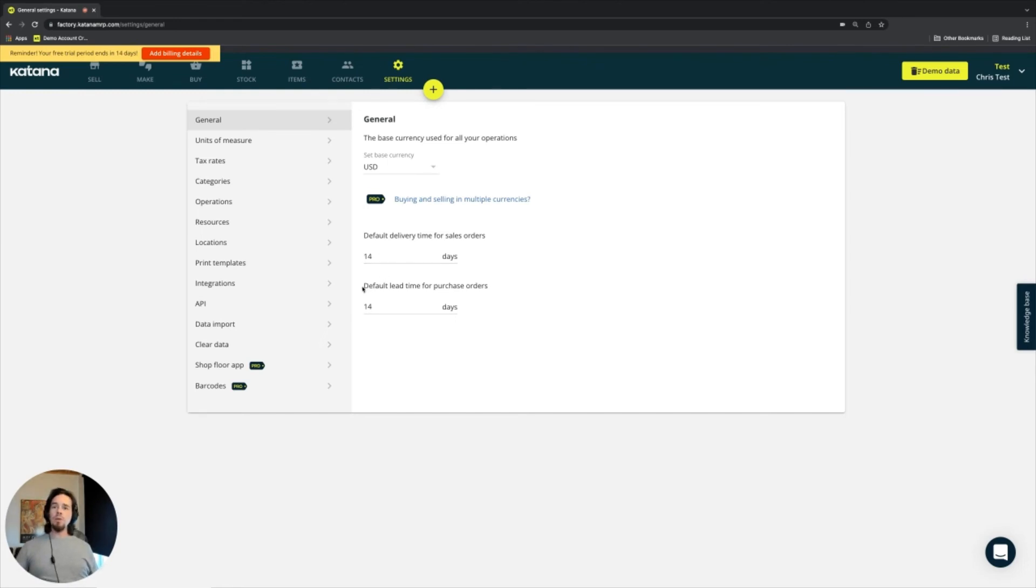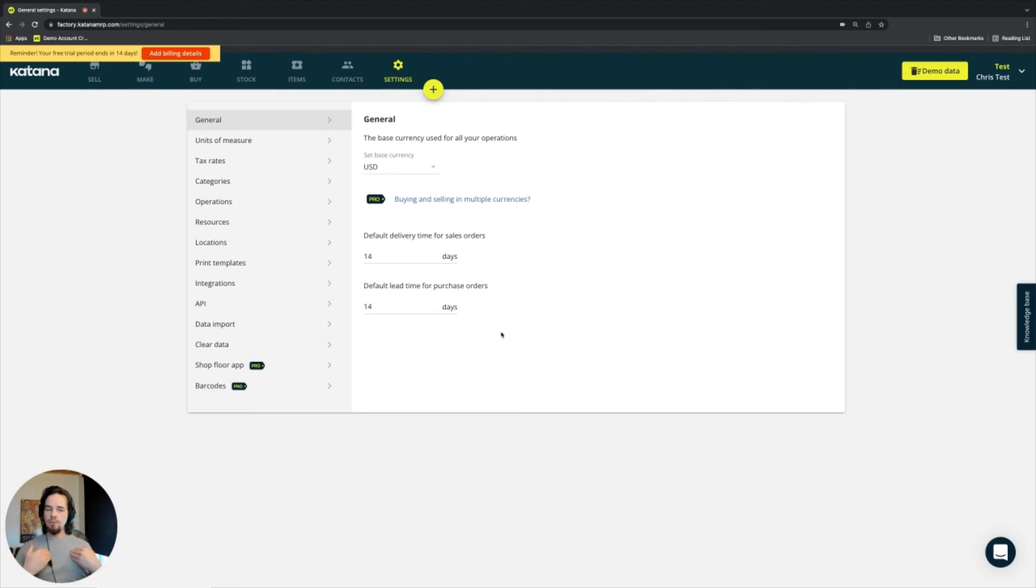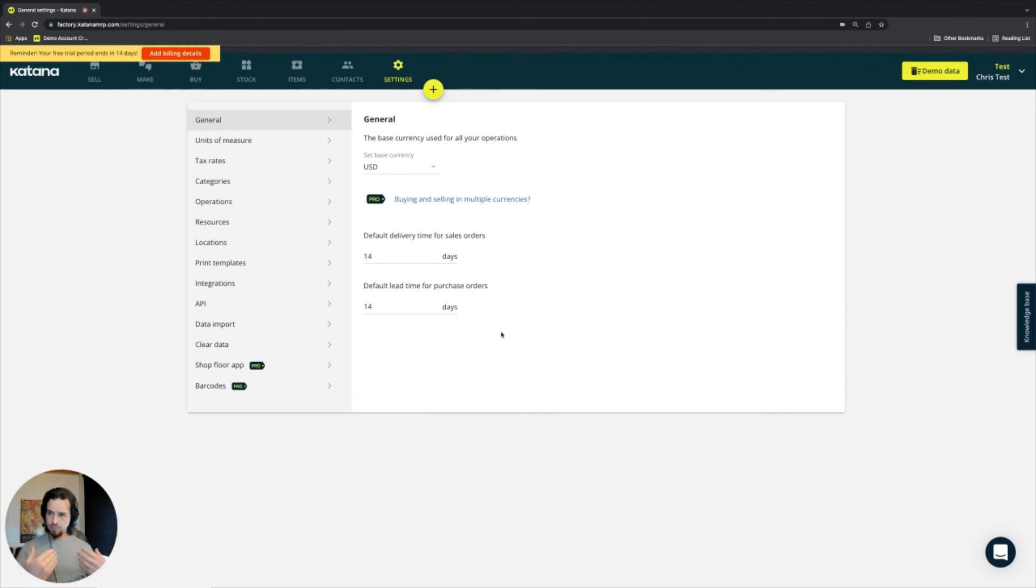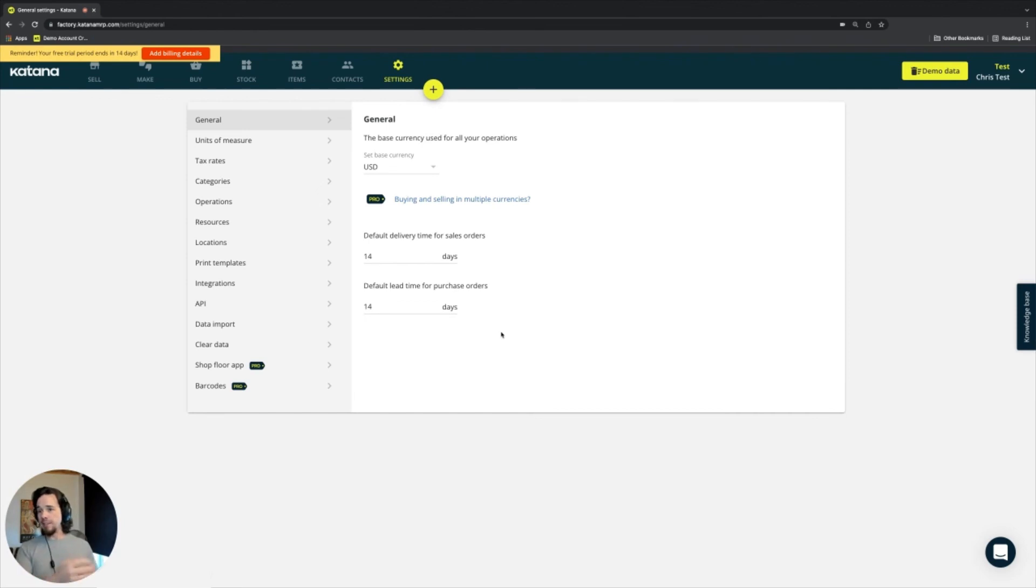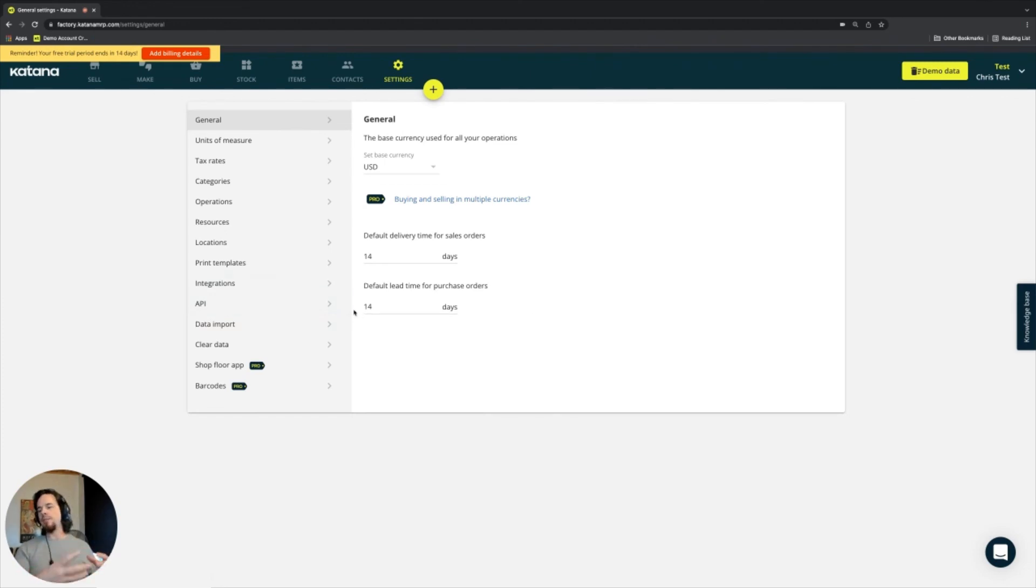We also have a default lead time for purchase orders. So what is a lead time? A lead time is when do you expect something that you buy to arrive. In its most simplified terms, you buy something on Amazon. As a consumer, you're purchasing it, you're issuing a purchase order by making the decision to buy it. And if it typically takes 14 days for that to arrive, then that purchase order will have an expected arrival date 14 days away.